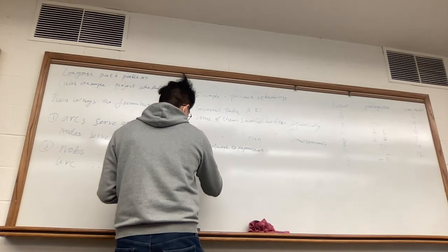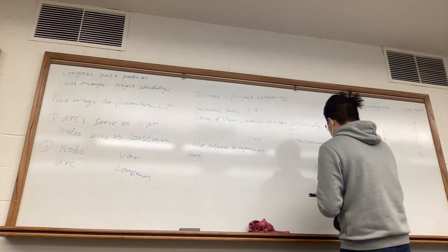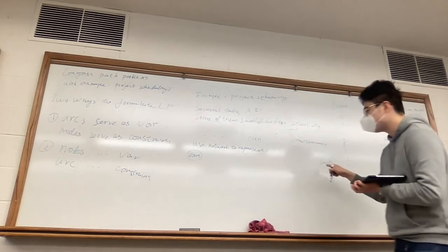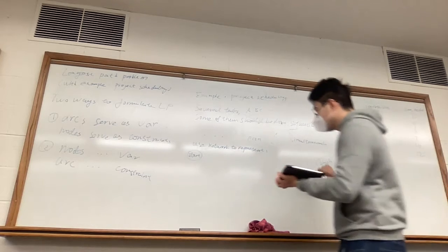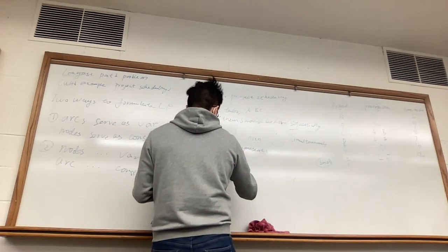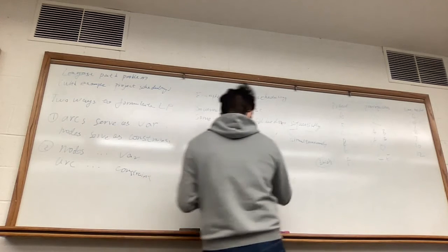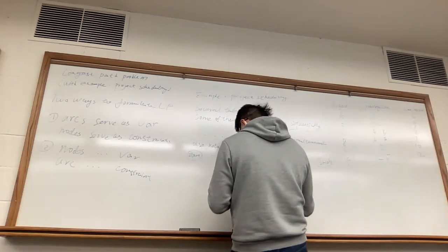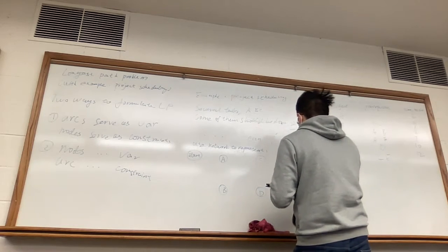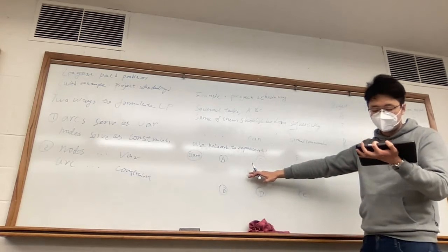First, we create 2 nodes, which are start and finish. This means your first day of university, and this is the day that you graduate. And because we have these many projects, we create these nodes: A, B, C, D, E, F. These are the tasks that we want to do.